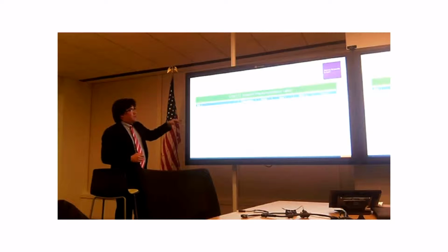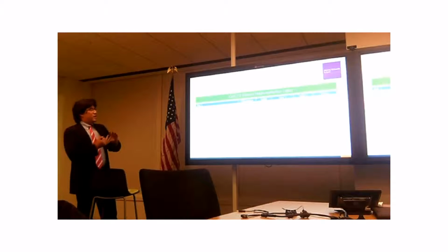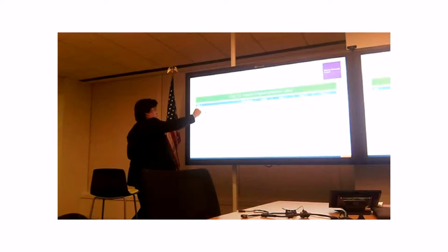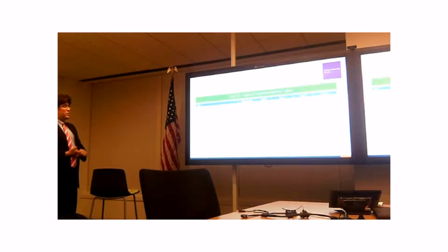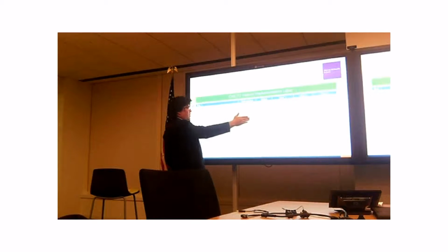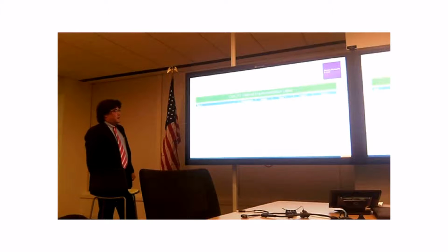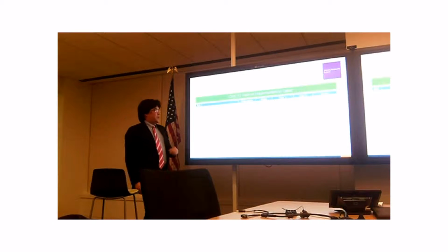So you go through and you do several rounds of reviews, and you look at these numbers. What you'll do in here, we've got the proof of concept number of weeks, the Lync setup, the geographic rollout between the two other offices, the number of weeks, the total number of weeks. So that's just the sum of these. The number of full-time employees required to make that happen, the cost per week per employee, and then the total internal implementation labor costs. And then you've got this concept of Lync ongoing support for the employees, and you need an FTE to do that. So you need 3 FTEs in year 1 all the way to year 3. You've got their annual fully burdened cost, and internal labor risk adjustment is 10%, and you calculate the total.